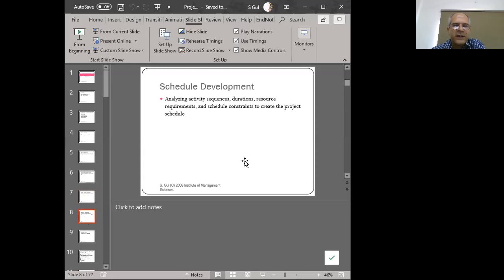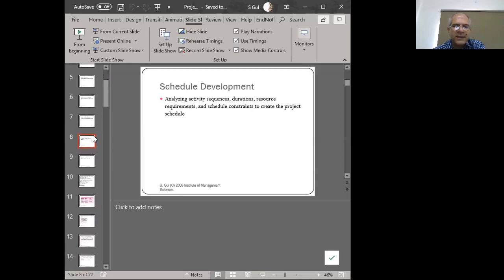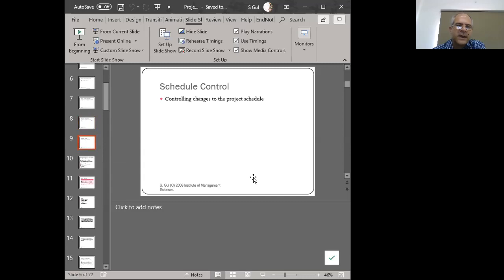Schedule development requires that we sequence out these activities and we produce basically our network diagram, and then place that on top of the Gantt chart and put our holidays and our break times into it, and the shifts that we've got running, so that we can go from the amount of working days into the calendar days, right? So schedule development is this idea of actually taking your network diagram and developing your Gantt chart, which is your formal calendar days that are required to produce your project.